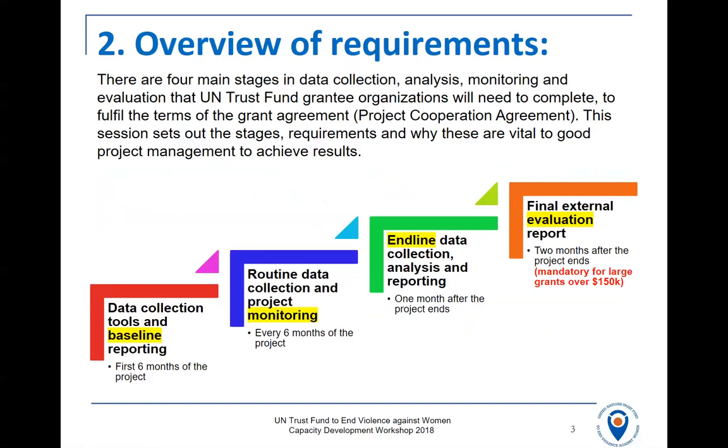And then at the very end of the project, we ask you to collect the final data, and we expect you to report on that 1 month after the project ends. And then at least 2 months after the project, we expect large grantees to manage and deliver a final evaluation report, which is completed by an independent expert.